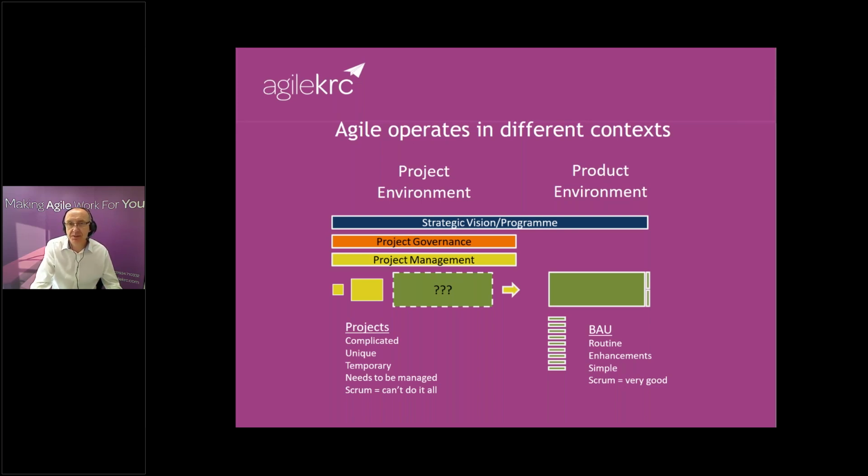Now, it doesn't matter whether it's PRINCE2 Agile, Agile DSDM, or what government digital services in the public sector in a few places in the UK are using. They're using variants and flavors and different terminology here. But a project is basically a project that needs to be executed. Now, here's a very important thing to remember. You cannot manage a project with Scrum. You cannot run a project with Scrum alone. But you can use Scrum on a project quite happily.